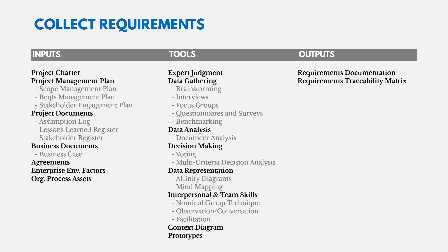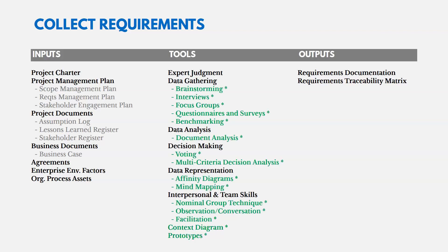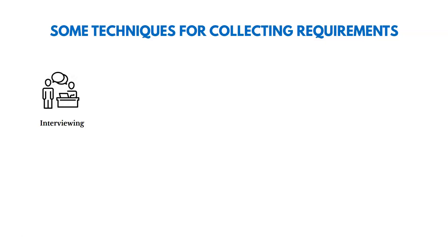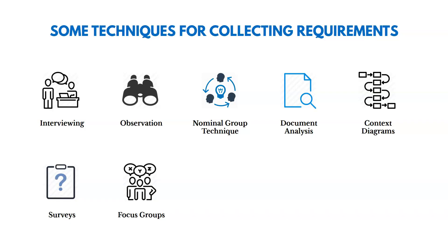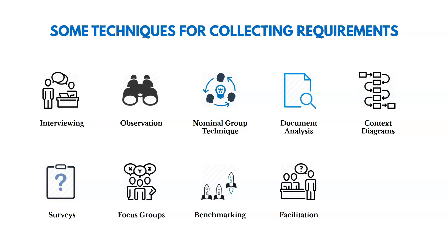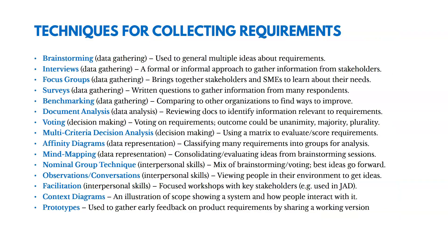The outputs of collect requirements are requirements documentation and the requirements traceability matrix. You also have many tools to help collect requirements from customers. These include interviewing, observation, the nominal group technique — a method for brainstorming with groups — document analysis, context diagrams, surveys, focus groups where you bring in subject matter experts for input, benchmarking to compare yourselves to other organizations, facilitation for organized discussions with stakeholders, and prototypes to gather requirements by sharing a working version of the product.